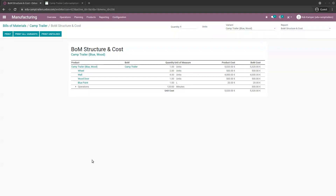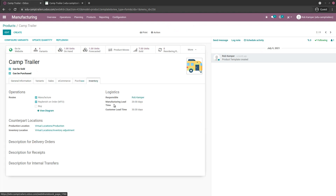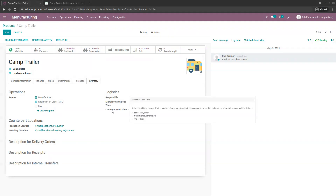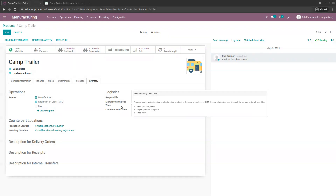The Chemtrailers are customized to order, so it can take time to produce and deliver them — this is why we use lead times. There are several types: the customer lead time is the default duration you set, so the expected date on the sales order is today plus customer lead time. The manufacturing lead time is the expected time it takes to manufacture the product, independent of the quantity and not accounting for queuing time.